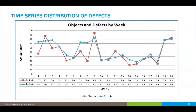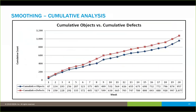We looked at how the defects were distributed over that 20-week period using a chart showing objects created in red and defects introduced in blue. Even with a lot of variability, they tracked relatively close to each other. Looking at the cumulative curves smoothed the noise out considerably. The telltale sign was that the cumulative defects on top were actually greater than the cumulative objects in blue — meaning on aggregate they were producing more defects than they were producing objects. A very serious problem that required drastic measures for remediation.